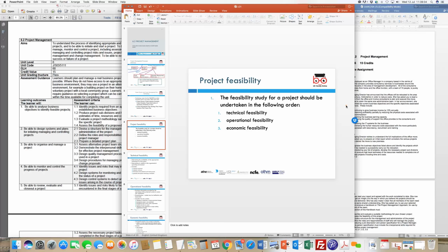Operational feasibility is going to be the number of people who are going to be involved, what their roles are going to be, who is going to be the project manager, who's going to be the assistant project manager in case the project manager is not available, so somebody takes that responsibility over. Key set of people who will be involved, who's the project sponsor, who's going to be the key principal sponsor who will sanction all the costs and approve all the basics of the project. And that is all nothing but operational feasibility.